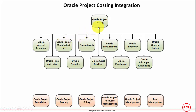Ultimately, the project costing module is a central repository which collates all the costs from all these sources. The invoices processed for suppliers which are related to the project are integrated with Oracle Project Costing and they are reflected as an expenditure in project costing.